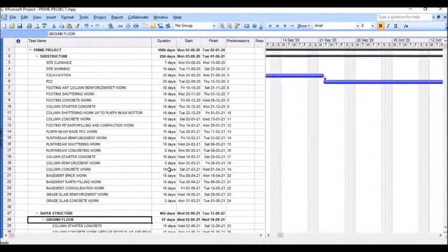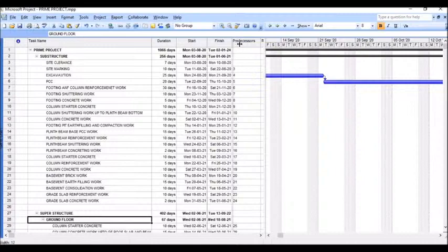This is the MCB, and it will be signed mutually by the contractor, PMC and the client, and we'll be strictly following this schedule. So for any deviation we need to put in a catch-up program, and we need to drag the project back on schedule. This is the main thing.